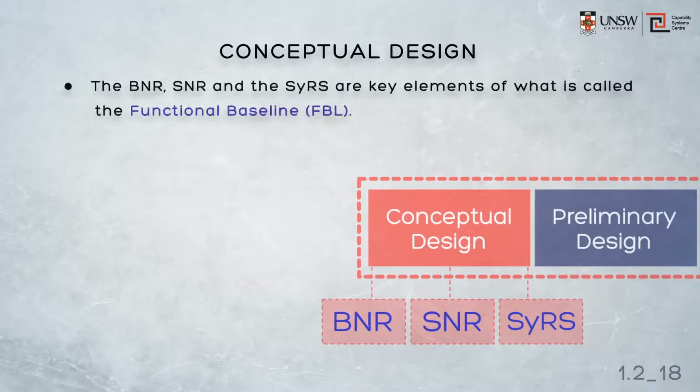The System Requirement Specification is the key element of what is called the functional baseline. The functional baseline represents the system-level logical architecture that describes the whats and whys of the system that meets the business and the stakeholder needs and requirements.